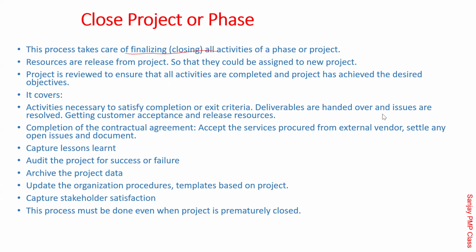Okay, so coming back to this, that releasing projects are reviewed to ensure that all the activities are completed and the project has achieved the desired objective. Very important thing, you need to ensure it covers activity necessary to satisfy the completion exit criteria. Deliverables are handed over, and issues, if there are any, are resolved. Get the customer acceptance and release the resources.